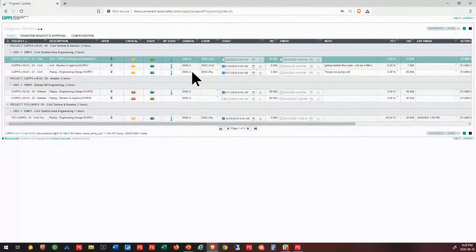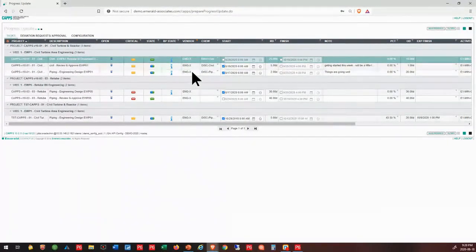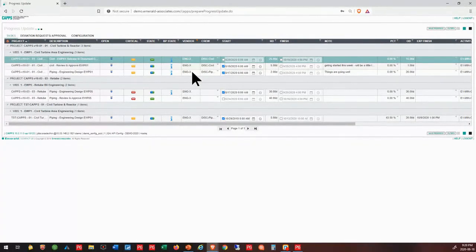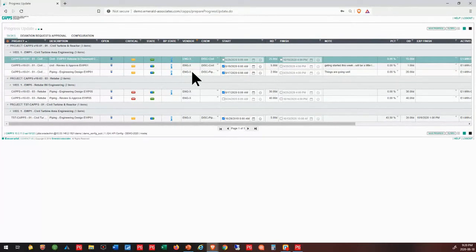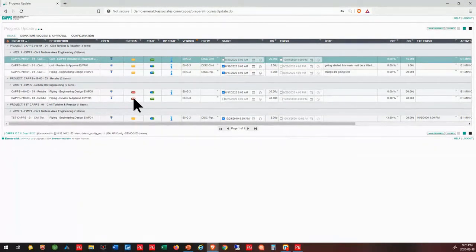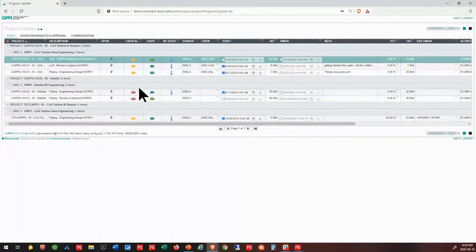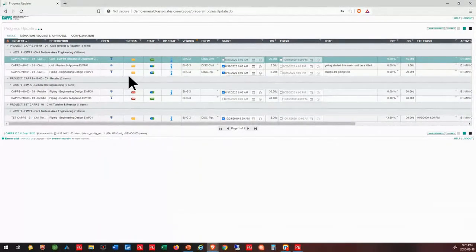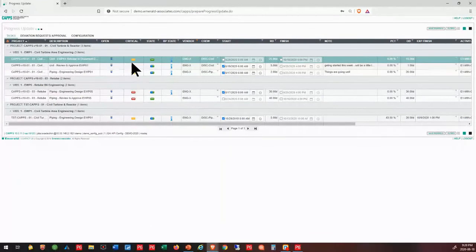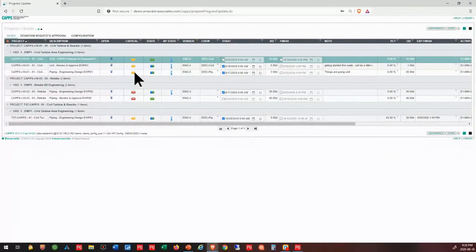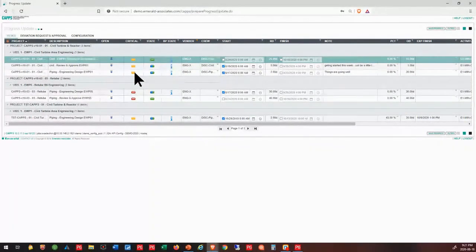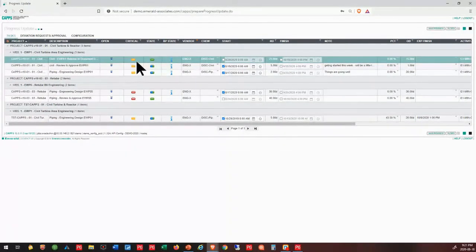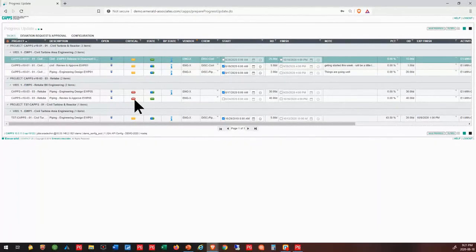So, I also have some other fields on the screen to try and make it a little bit easier for me to know which activities are big showstoppers. So, the first thing you might notice is we've got some that are critical. So, that's an important one. Obviously, we don't want to forget to be talking about these critical ones. Now, we've also configured a near critical. So, this sort of yellowy orange is a near critical. And that's configurable in the background. So, that we're not missing these important ones that you want to make sure you don't forget.